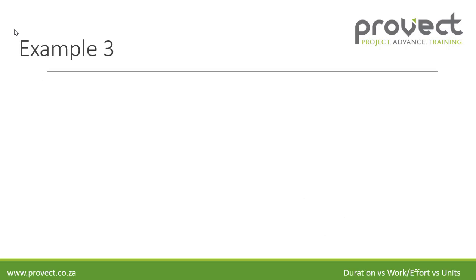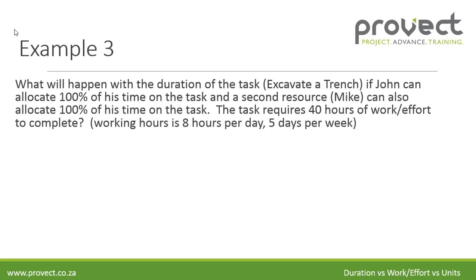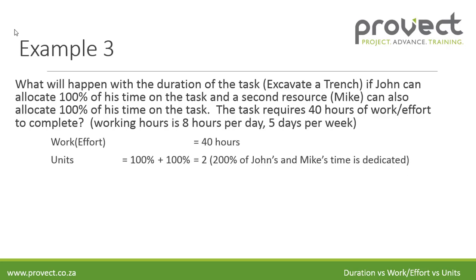Now let's look at example three. What will happen with the duration of the task to excavate the trench if John can allocate 100% of his time on the task, and a second resource, Mike, can also allocate 100% of his time on the task? The task still requires 40 hours of work or effort to complete. The work is 40 hours. The units are now 100% for John plus 100% for Mike, which is 200%, equaling two.